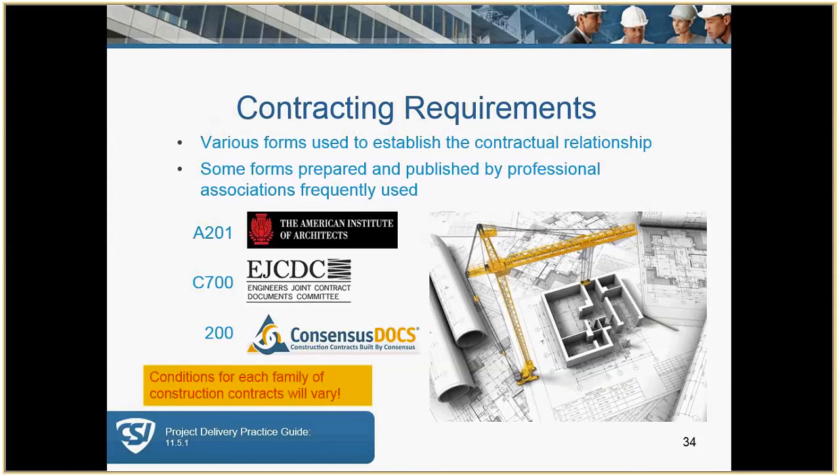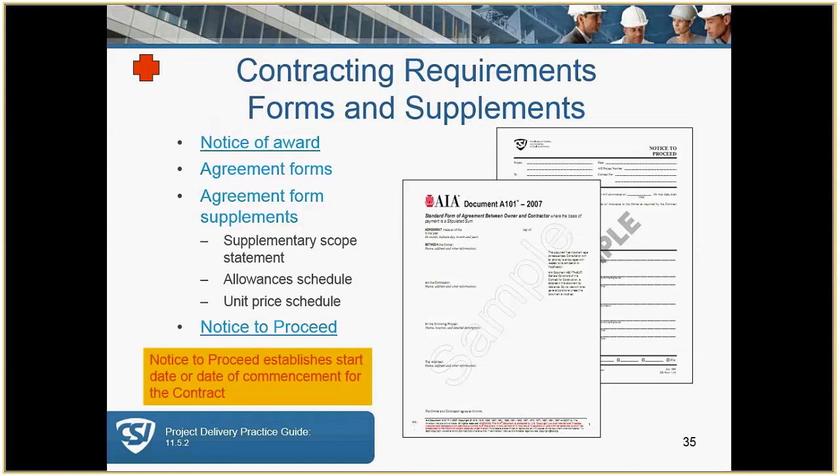So the whole idea behind having these families is that you utilize one family and it makes things a lot easier. The contract forms are generally pre-printed and should be bound in the manual. Keep in mind that these documents are also copyrighted, so you simply cannot bind the original in there and make copies of it, which can be rather expensive to do for bidding on a small project. Keep in mind, because these are standard documents, you can simply reference them.